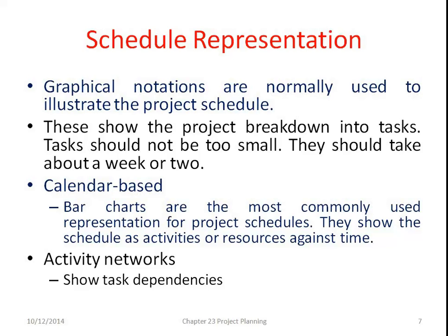Schedule representation: how is the schedule represented? Graphical notations are normally used to illustrate the project schedule. It may be a bar chart or similar. These graphical notations show the project breakdown into tasks. Tasks should not be too small. They should take about a week or two. It may be calendar based or an activity network.